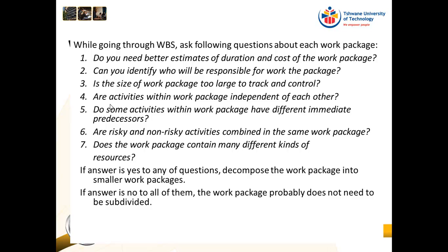Then, are the activities within the work package independent of each other? Because you don't want activities to be dependent within the work package, because that means that you cannot track it on the schedule. If you're waiting for me to do something, but the schedule doesn't show that you're waiting for me, then it becomes very difficult to track.